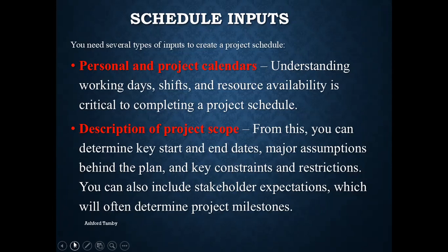Any suppliers that you have, they are told no deliveries would be done on that day, right? Even the security for your compound, they know that nobody would be on the compound on that day, right? And this is important, right? Because if you decide that you are going to work on the 2nd of May, it's a holiday, then it affects your budget if it wasn't catered for already. When you have to work on a holiday, in some companies, it's either double time or triple time that you're paying, right?